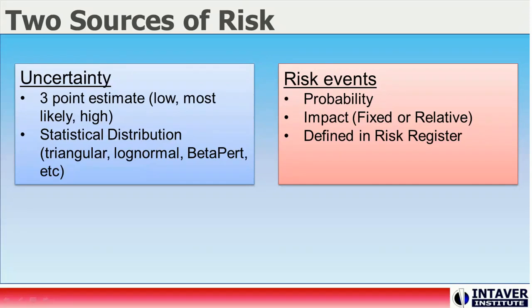When creating a cost risk model, we can apply two types of risks to our costs: uncertainty and risk events. Uncertainty is characterized by three-point estimates — low, most likely, and high — combined with a statistical distribution. Uncertainty can be applied to both duration and costs for the purpose of cost analysis. Risk events are also sometimes referred to as risk drivers, and are characterized by a probability of occurrence and impacts. For cost risk analysis, both fixed costs and schedule impacts can be used.